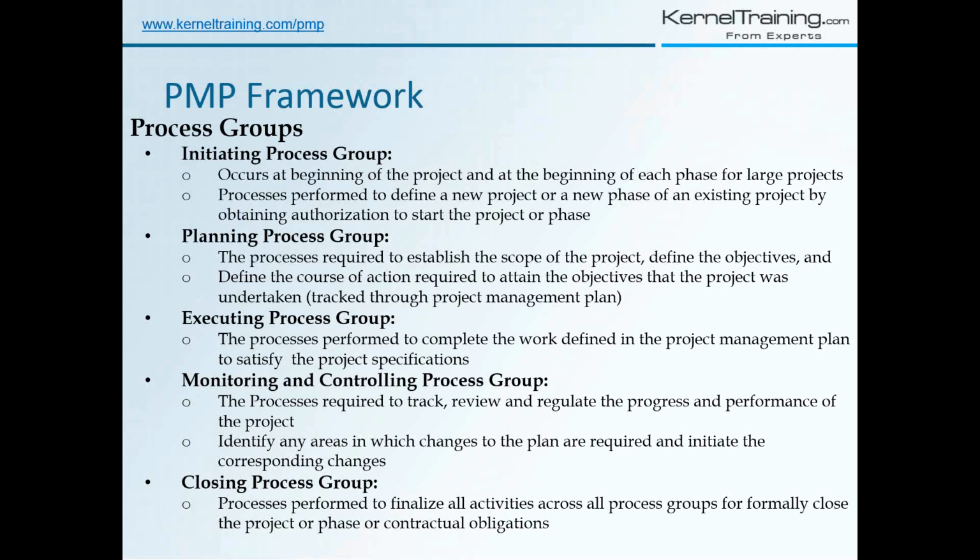So you need to have a project charter before starting your project, before assigning resources to the project. All right, so project charter is a very important process where inputs are the SOW, which is provided by your stakeholders, customer, and then your business case, that is the requirement need of the project, whether we should go for that project or not. The business case actually tells us, you go for checking your NPV, ROI and all, and come up with the business case. And agreements, if suppose the complete project is on agreements, then those are very important inputs in developing a project charter.